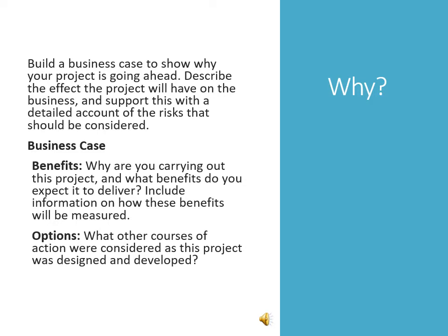The business case normally includes the benefits. Why are you carrying out this project and what benefits do you expect it to deliver? Include information on how these benefits will be measured. Definitely include some options, like what other courses of action were considered as this project was designed and developed.